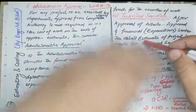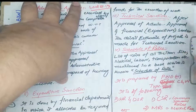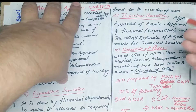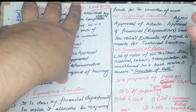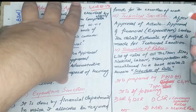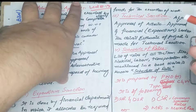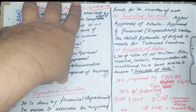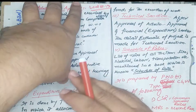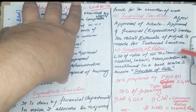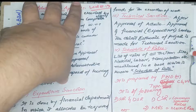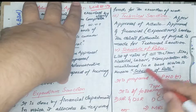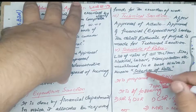The fourth topic is the schedule of rates. What is schedule of rates? It is a list of rates of all items like materials — concrete, steel, cement, sand, crash or woodwork, aluminum work — as well as excavation, labor rates, and transportation charges, etc., mentioned in a book which is known as the schedule of rates.